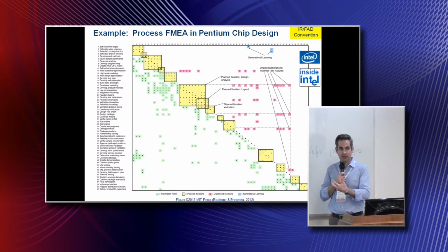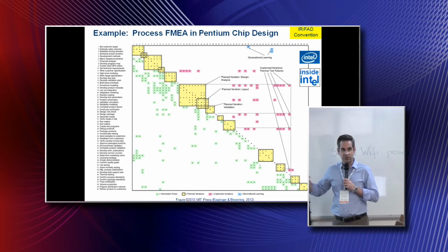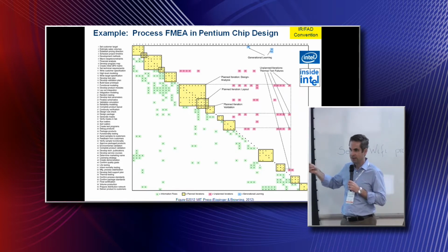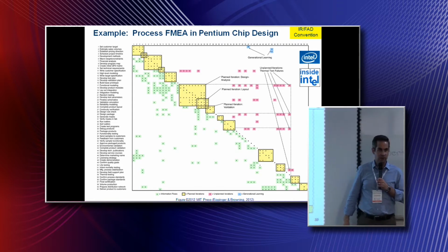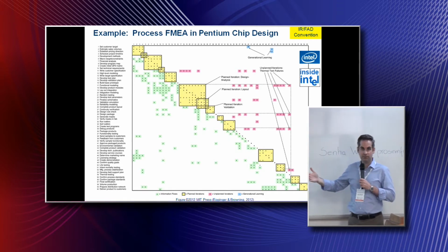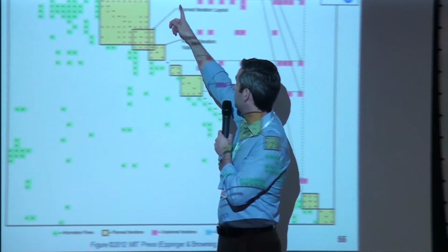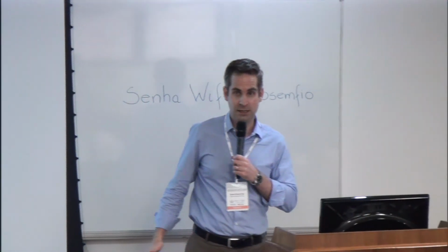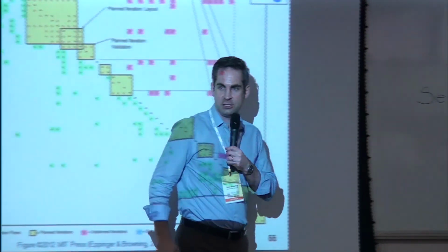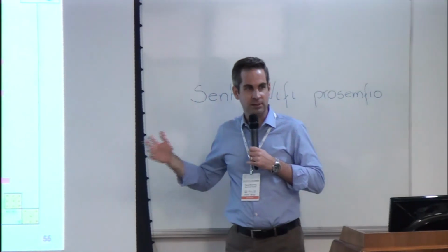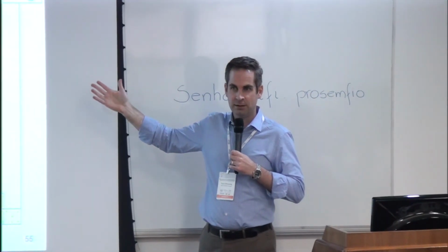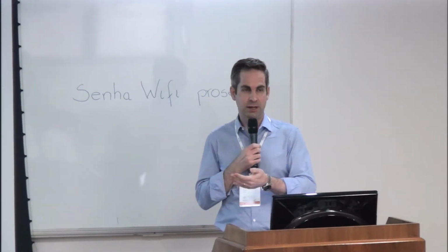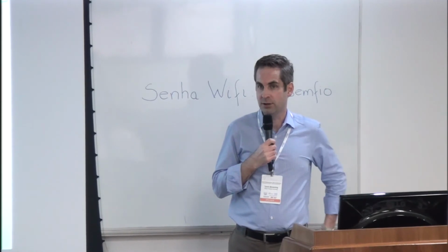All of these were not recognized or known initially, but over time, as they do more projects, they start to learn what ways a project might go wrong and capture these as potential failure modes so that the next project can be aware of them. And now when they're doing certain activities like this one that have a lot of potential ways that future results could come back and make them change what they did originally, they do their original work, their original design decisions, in a more robust way to minimize the chance that something later will need to be done differently. And if it is, so that it'll be easier to do that thing differently. So there are a lot of potential benefits for these types of models besides just minimizing or eliminating feedback marks.